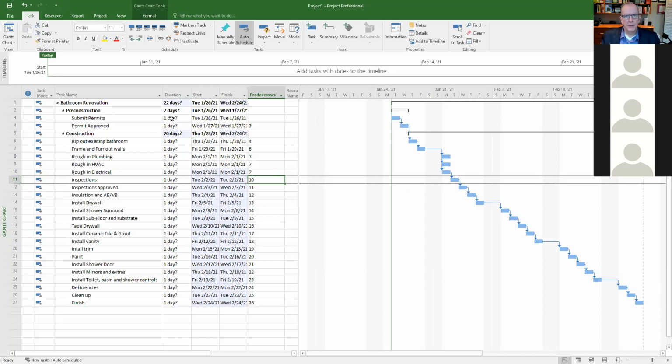But you've got to be careful of that in reality. You've got the physical constraints of where you're doing the work, and it's called stacking the trades, where you have too much stuff going on at once. And then people get upset with each other because they're in their way and they can't do their work. Now they're wasting time and now it's costing them money. So as a project manager and a site super, you've got to be very cognizant of where the line is.